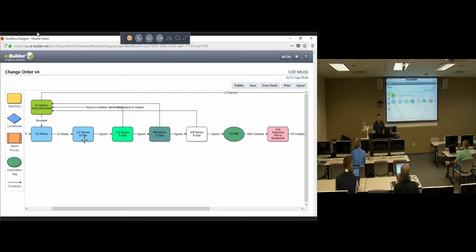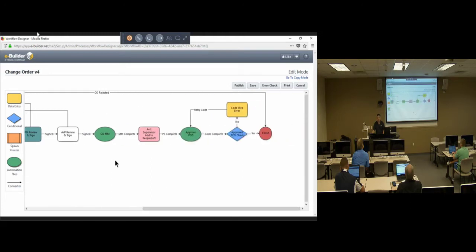Once you sign it, essentially, electronically, it goes to the AE on the project. They do the same thing. They see that exact same information, sign it. Then it goes to the project manager. They sign it. Then it goes to the AVP, the associate vice president. Vice president. After they sign it, for the most part, it's done.